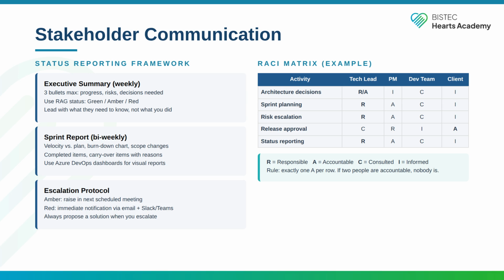Second, the sprint report. Bi-weekly, aimed at your direct stakeholders. Cover velocity versus plan, burn down trajectory, scope changes and their impact, completed items, and carryover items with explanations. Build Azure DevOps dashboards for these. Set them up once and they update automatically.